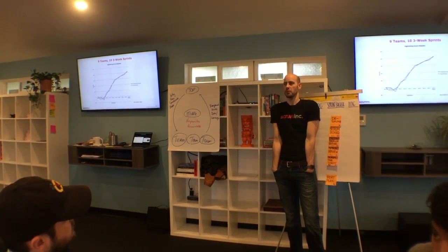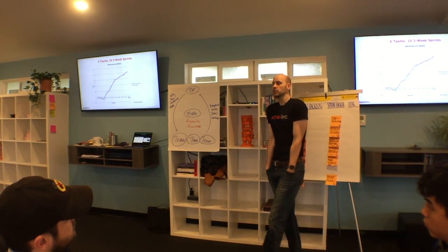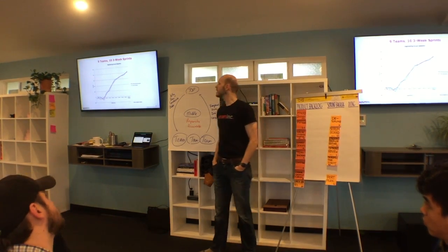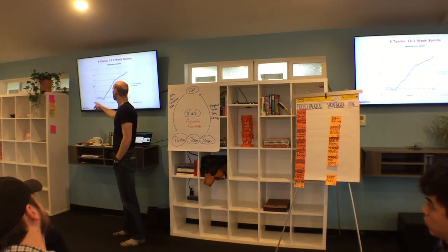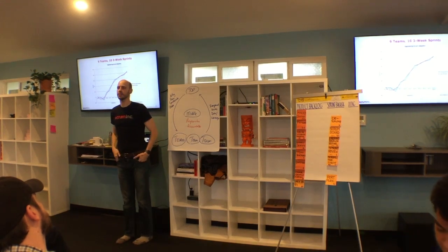Just a minute, Jack. One more, please. They put 9 other teams around them, no walls in between. So everybody could hear and see everybody all the time. What this did is, by observing the high-performing team, all the other 9 teams went up to 4x on average.